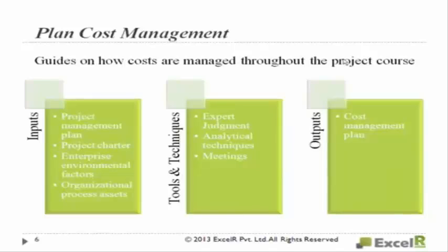And enterprise environmental factors, like the current exchange rates, is one of the things which you look into. The EEF also includes market conditions: which are available locally, which are not available, which you have to import, which you have to export. That will throw you some idea on your cost management plan. Okay. Resource rates: what is the human resource average rate now? For a .NET developer, what is the average cost now? So that will give you a fair bit of idea when you are doing the cost management plan. Okay. These are the EEF factors which are useful.